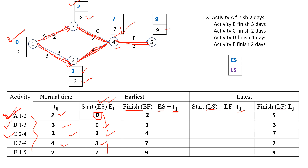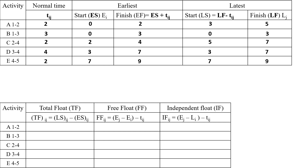Similarly, we calculate the latest start time using the formula: latest finish time minus activity time. For activity A: 5 minus 2 equals 3. For activity B: 3 minus 3 equals 0. For activity C: 7 minus 2 equals 5. For activity D: 7 minus 4 equals 3. For activity E: 9 minus 2 equals 7. After completing the earliest and latest time calculations, we draw another tabular column for total float, free float, and independent float.